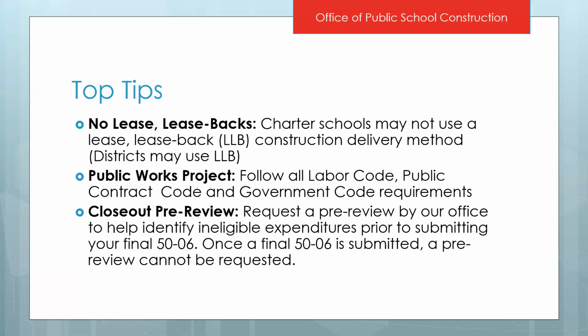For your construction delivery method, it is the responsibility of the applicant to determine with their legal counsel what method to use, but we have determined that charter schools may not use a lease-back construction delivery method. At this point, districts may use this construction delivery method. So if the district is the applicant or managing the project and the one entering into the lease-back, that is allowed. However, charter schools may not enter into a lease-back.